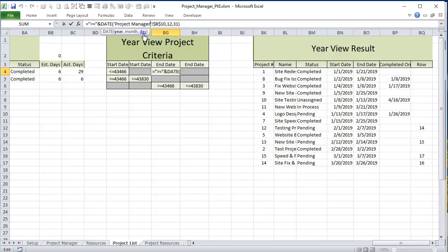So in this particular condition, I'm looking for any job that starts on or before the 1st of January and ends on or after the last day. That would mean something that starts in 2018 and ends in 2020. That would be included. That's one choice, right? One.